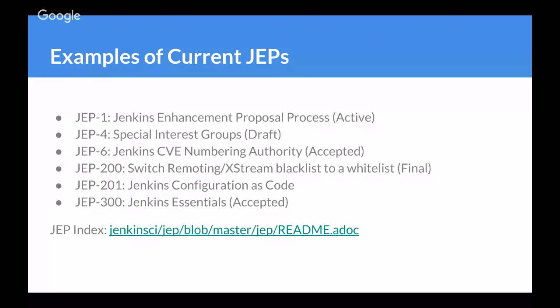It was still a very large task, and what this is talking about is the rollout of that. So the change is released, it's in core, that implementation has been finished, and all of the rollout tasks that we had in terms of making sure that the major plugin issues were addressed. How do I say this? That JEP described the scope of the work that we would do for that effort, and that scope of work has been completed, so it's final.